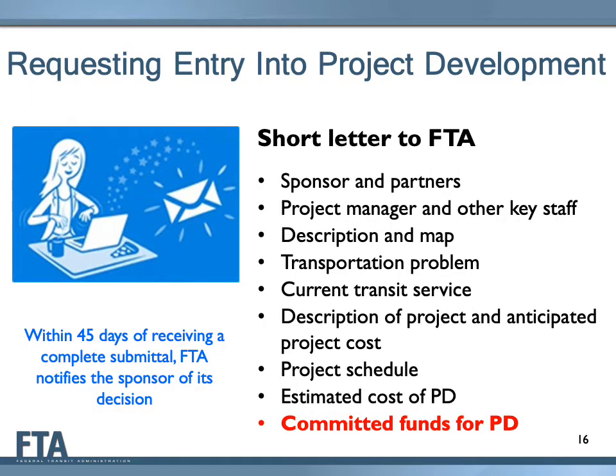Project sponsors wishing to request entry into the project development phase must submit a short 2 to 5 page letter to FTA that includes the information outlined in the CIG policy guidance found on our website. The request letter should be submitted electronically to FTA for faster delivery. There is no standard format for the letter.